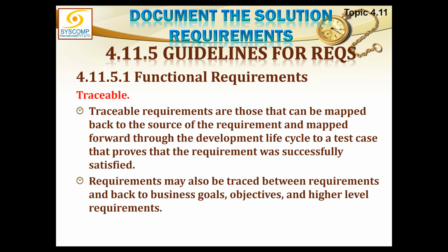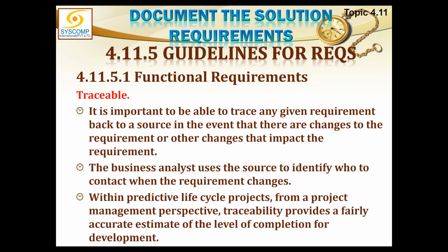Traceable requirements are those that can be mapped back to the source of the requirement and mapped forward through the development lifecycle to the test case that proves that the requirement was successfully satisfied. So traceability should be there. Requirements may also be traced back to the business case, business goals, objectives, and high-level requirements. It is important to be able to trace any given requirement back to the source in the event that there are changes to the requirement or other changes that impact the requirement. The business analyst uses the source to identify who to contact when the requirement changes within the predictive lifecycle project.